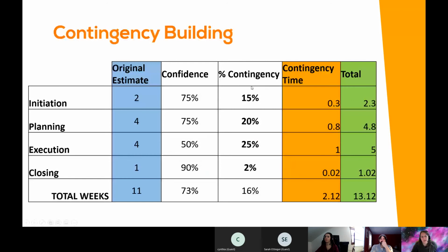Or you can make a call directly, not based on your confidence threshold, but saying, this is how much contingency I need. Let's multiply the original effort times the contingency. The total that I'm asking for in time is going to be 2.3 months instead, because I'm adding contingency of 0.3 months. Again, I'm just using the months example.